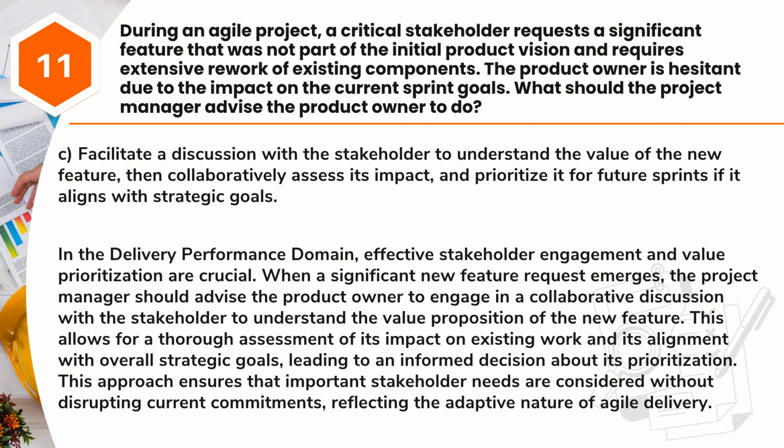When a significant new feature request emerges, the project manager should advise the product owner to engage in a collaborative discussion with the stakeholder to understand the value proposition of the new feature. This allows for a thorough assessment of its impact on existing work and its alignment with overall strategic goals, leading to an informed decision about its prioritization. This approach ensures that important stakeholder needs are considered without disrupting current commitments, reflecting the adaptive nature of agile delivery.